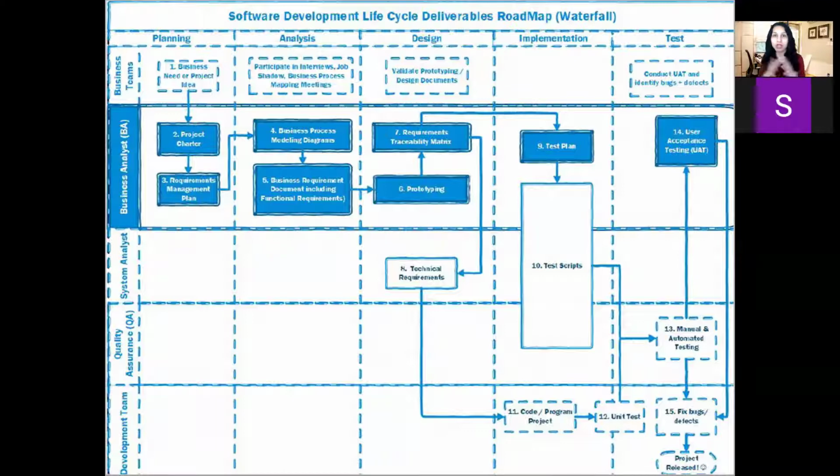Are we going to have continuous 5 days of testing? Or are we going to leave it open for 2 weeks for anybody to go in and play around and give us bugs, identify bugs? And if no bugs, then we approve it, which is typically not how it's done. Typically, you'll set 1 week of testing and you'll make it a requirement for each of your teams that have provided input to go in for a specific time frame or to do end-to-end testing. And this is where we'll find the majority of our bugs, when our UAT testing is happening. So what I just described is what typically happens in UAT.